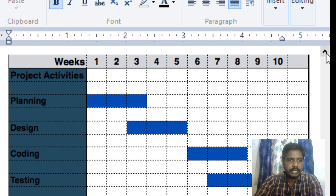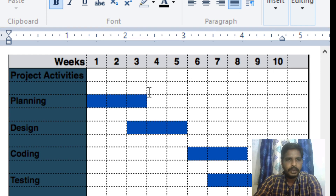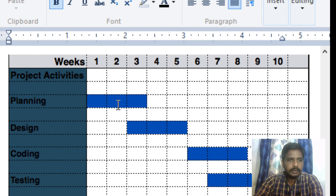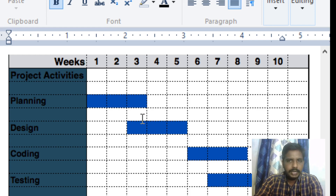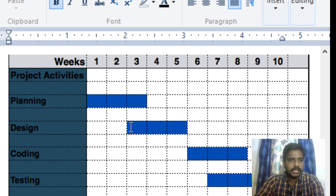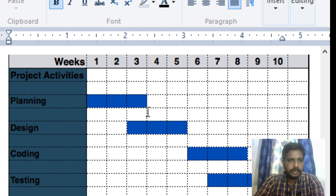For example, we create a 10-week timeline. The first three weeks are for the planning process. In the third week, we start the design process, and in the fifth week, we complete the design process — so two activities are complete. Then we start coding in the sixth week.